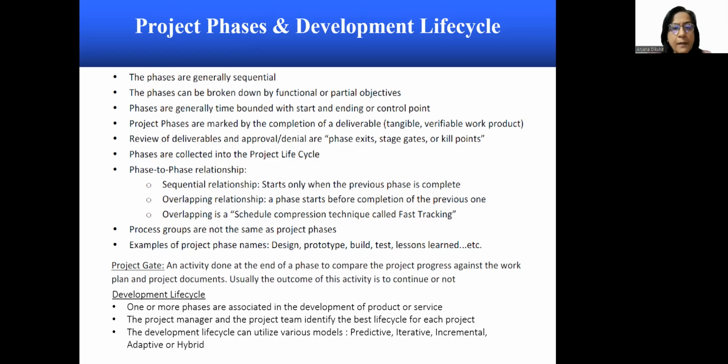Development life cycle. Here it is one or more phases which are associated with the development of a product or service. The project manager and the team identify the best life cycle for each project. The development life cycle can utilize various models: predictive, iterative, incremental, adaptive, or hybrid.